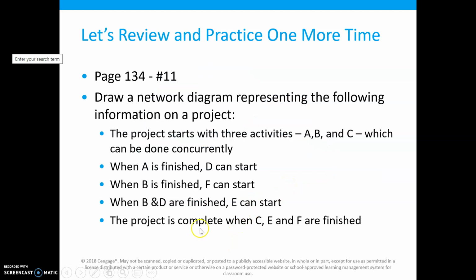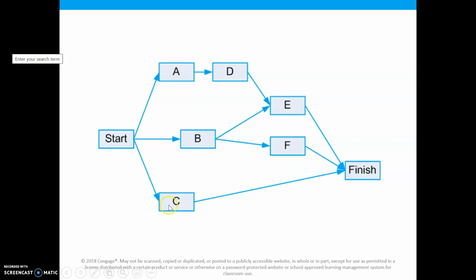And last but not least, the project is complete when C, E, and F are finished. So you can see C, E, and F all lead to the finish. So that would be your network diagram for that problem.